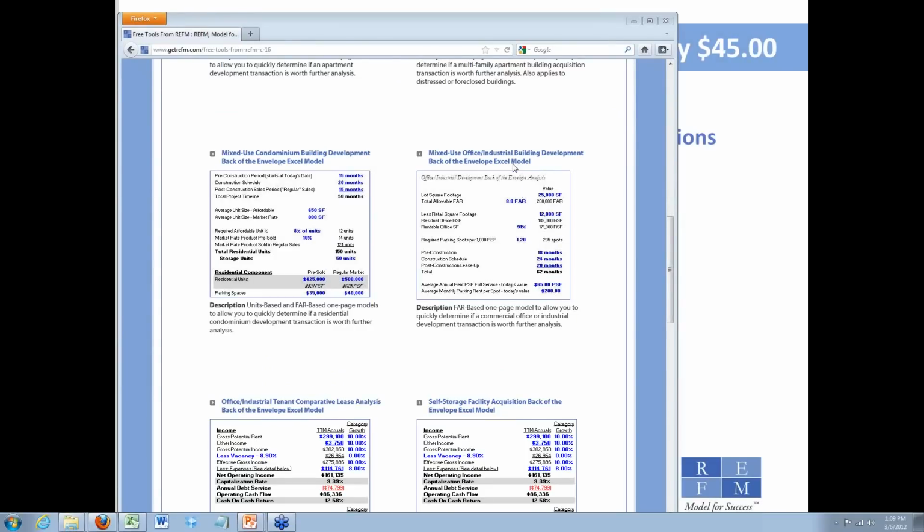Question: where do your hard and soft cost estimates come from? The way that we offer a service to the market is we provide the tools, and you as the client, you provide the inputs. A generic source for hard cost information, sort of as a first pass, is RS Means. They have a free 7-day trial at meanscostworks.com. I also have some other links on the resources page of my website and our blog.